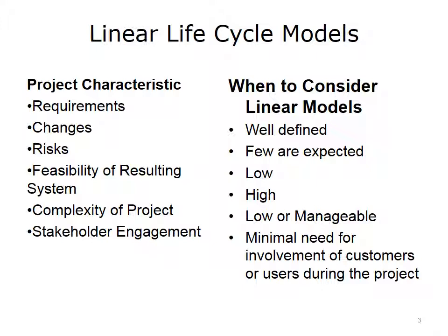Linear models can still accommodate some change, but generally, the risks are perceived to be relatively low, and there's a lot of understanding about what needs to be done. Linear life cycle models lend themselves well to admission, discharge, transfer projects because you know you have to build specific hospital details into the software. You have to build in your units. You have to build in your beds before you can go on to build in other things in the system. So linear life cycle process works very well for those types of back office projects.